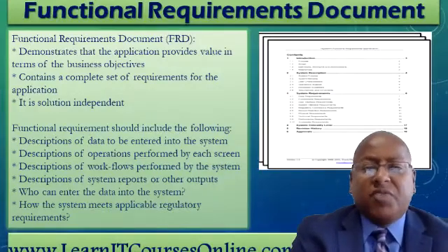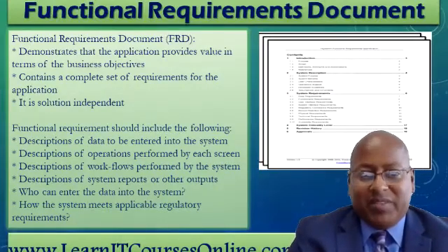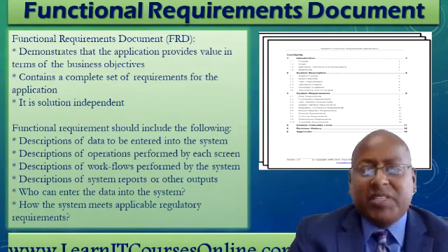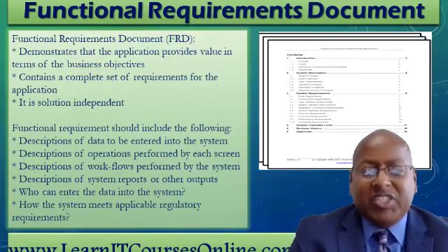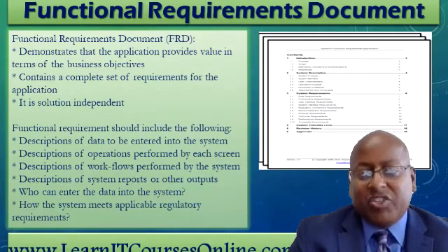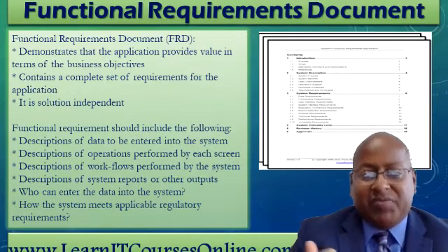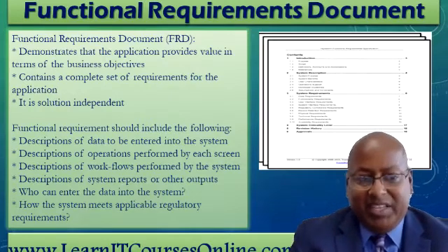So now we move to functional requirements documents. The functional requirements document, FRD, is a formal statement of an application's functional requirements. It serves the same purpose as a contract. Here, the developer agrees to provide the capability specified. The client agrees to find the product satisfactory if it provides the capability specified in the FRD.